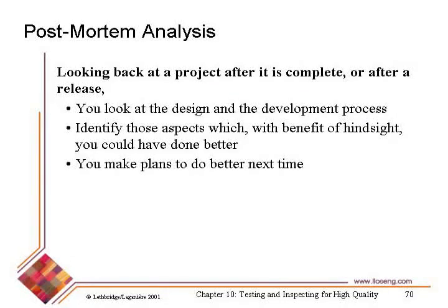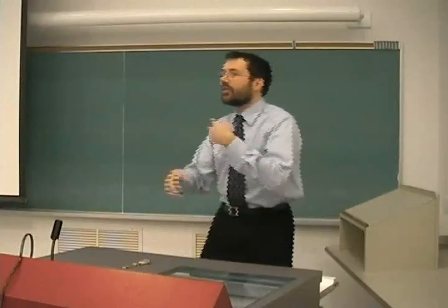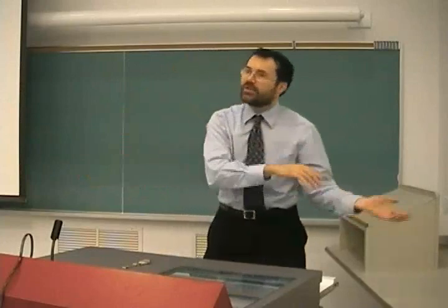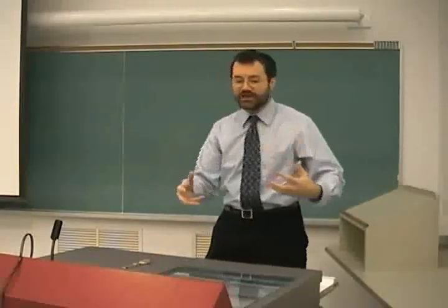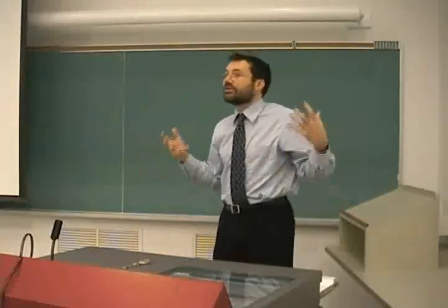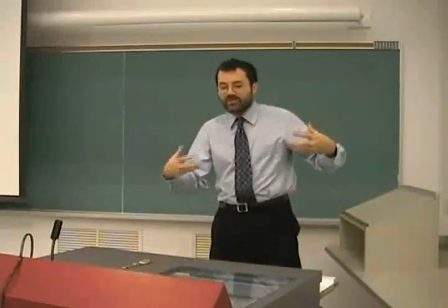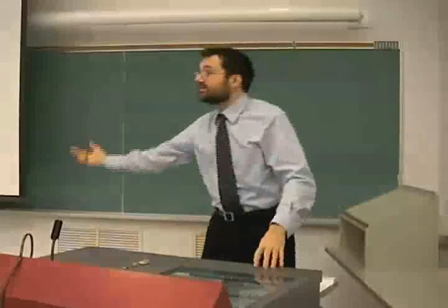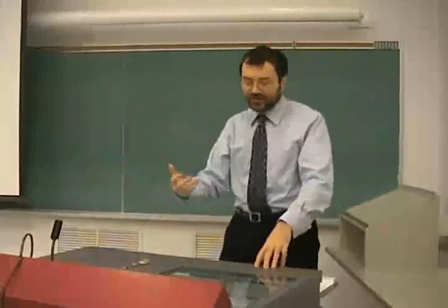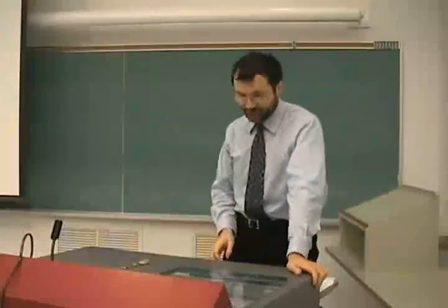As we're getting ready for the next cycle, we're going to learn some lessons. If you don't do this, you're just struggling on from day to day, week to week, month to month, and not really thinking back and thinking forward. So for postmortem analysis, you might get together with everybody for a day, maybe at a retreat somewhere. You analyze how you're doing, the techniques you're using, where training is needed, and try to make plans to do better next time.